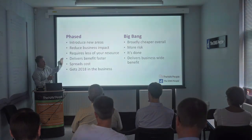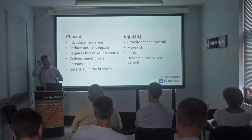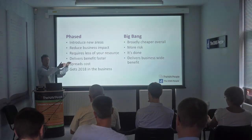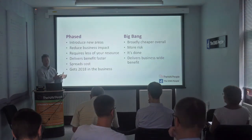But if you're particularly big and complex, you might consider phasing something in. For example, quite commonly we've had people say, when we are using the new system, we want to start using CRM. We don't use CRM today. So we say, okay, well, why don't we put the 2018 system in? You start using CRM for the people that want to use CRM, rather than start using it on your old system, start using it on the new system, even before you've started bringing on all the new other departments.